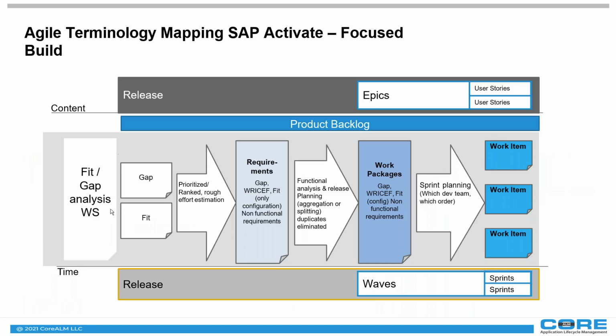Ideally, when you go through your fit-gap analysis workshop, you can identify a gap or a fit. Regardless of whether it's a gap or a fit, you're going to capture a requirement for that, and then prioritize that requirement from a rough estimation perspective. If you have your SI helping you, they are the S/4 experts. They should give you a pretty good effort estimation of how long it would take for a gap or a fit to be either configured, or for that gap to be designed, built, and completed.